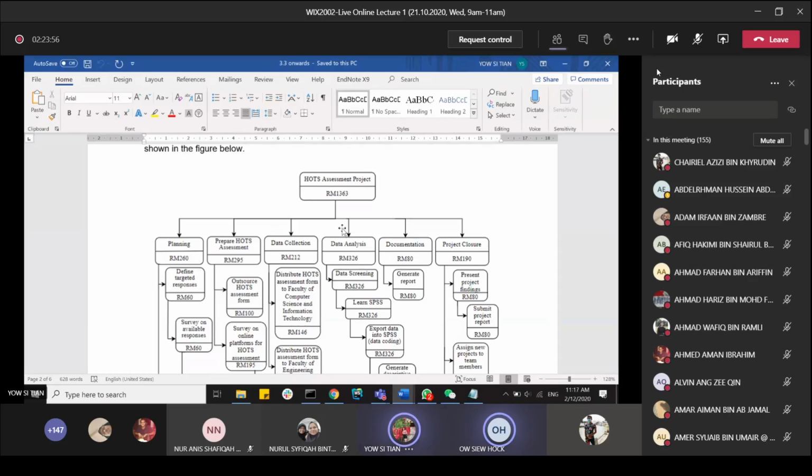Yeah. So your labor cost is very cheap. Means we are underestimating, is it? That's why if you compare your macro and your micro, it's a very big difference. 10,000 and 1,000 something. That is a big difference. That means you underestimated using the WP. The salary cannot be that cheap. Like now programmers, IT staff, they are very well paid, you know. So you underestimated using the WP approach.